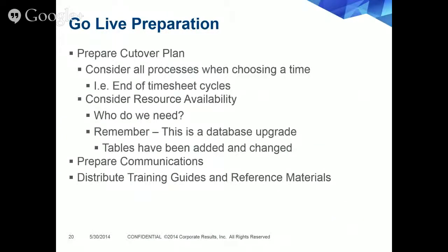We want to consider all the processes when choosing a time for this Go Live. Typically end of timesheet cycles work best, depending on what you have going on. And we want to consider resource availability. So who do we need? Remember that this is a database upgrade and that there have been tables added and changed. So this is important in terms of your Go Live preparation.